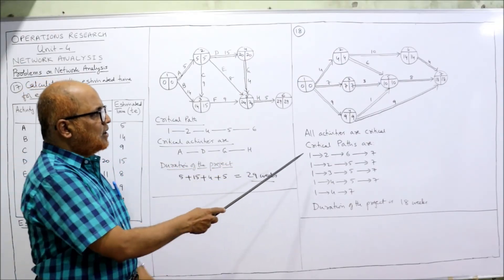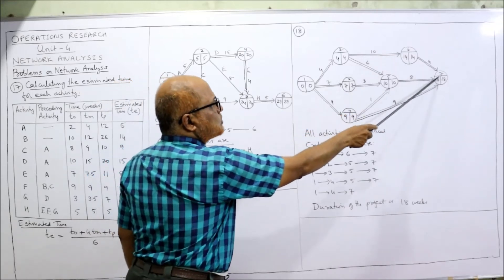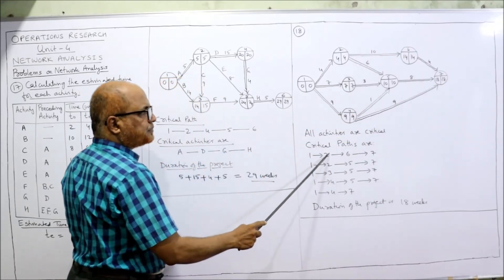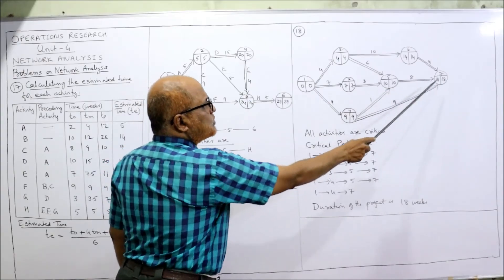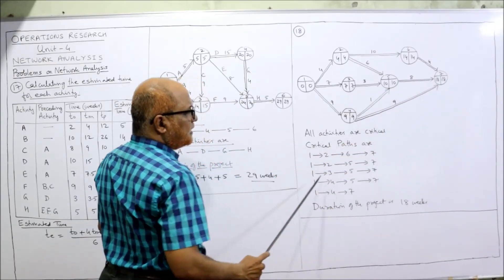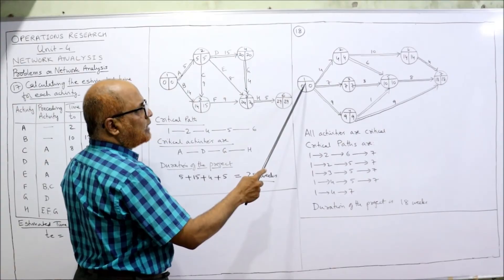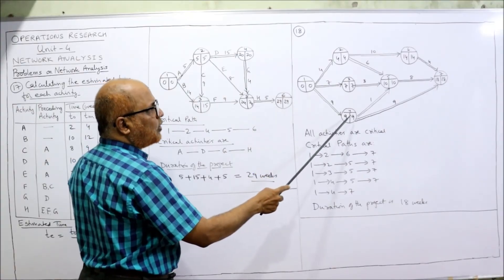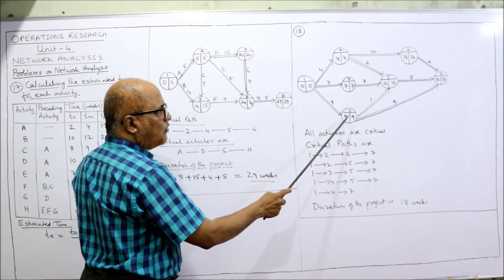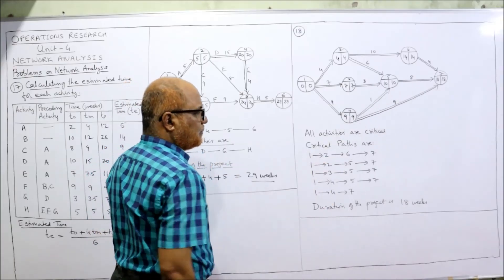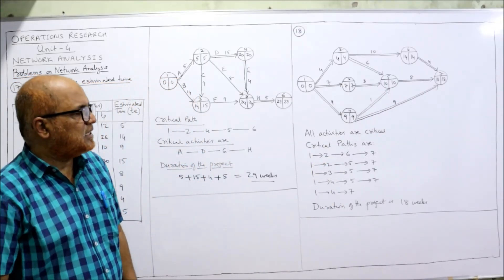The five critical paths are: (1) 1→2→6→7, (2) 1→2→5→7, (3) 1→3→5→7, (4) 1→4→5→7, and (5) 1→4→7. All activities are critical. The duration of the project is 18 weeks.